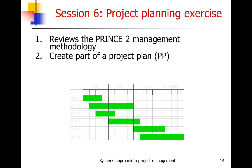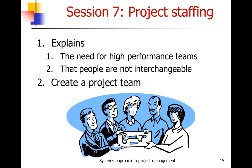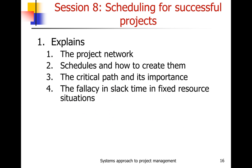Session 6 is a project planning exercise where you review the project management methodology and then create more of the project plan. Session 7 deals with staffing — it explains the need for high-performance teams and that people are not interchangeable. You get a set of resumes and create a project team, and then we see what different teams produce and why certain teams picked certain people for particular tasks. Session 8 covers scheduling: project network schedules, how to create them, the critical path and its importance, and discusses the fallacy of slack time in fixed-resource situations — something not generally mentioned in traditional textbooks.